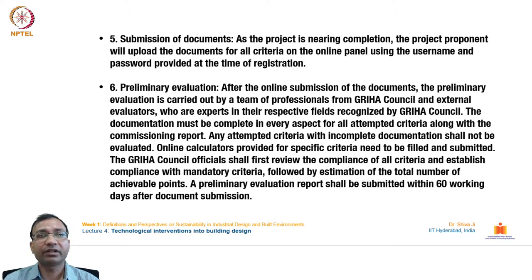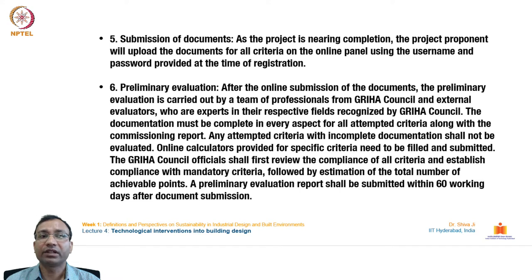Documentation must be complete in every aspect for all attempted criteria, along with the commissioning report. Any attempted criteria with incomplete documentation will not be evaluated. GRIHA council officials first review compliance with all criteria and establish compliance with mandatory criteria, followed by estimation of total achievable points. A preliminary evaluation report is submitted within 60 working days after document submission.